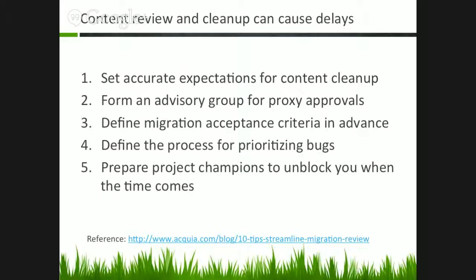And then another useful thing to have is a project champion, maybe a political appointee who can help you, who can set sort of the priorities for the department and help you move things forward if you get stuck. And we've had instances where this becomes really important. So a requirement that somebody has, they're just not willing to give up. That's a great instance where a champion can come in and bring everybody together that can solve an escalation before it gets out of hand.